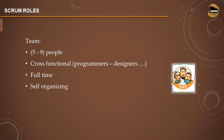The next major role is the Development Team, or simply called the Team. It generally consists of five to nine people — a small yet effective team that is self-organizing and highly motivated to complete their tasks. These five to nine people consist of cross-functional members, meaning people are multi-skilled across different technologies and domains. For example, it may include programmers, designers, and testers, each responsible for their own activities, with very good collaboration and face-to-face communication.